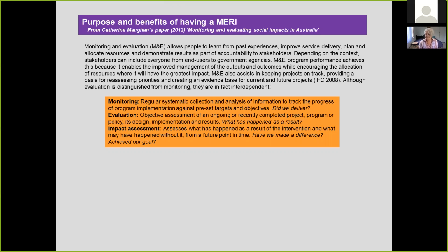That's regular systematic collection and analysis of the information as you're within the program delivering it, and the question there is, did we deliver? And then the idea of evaluation is really, well, what has happened as a result? And the impact assessment is, have we made a difference and have we achieved our goal? So different questions at different points in program or project delivery.